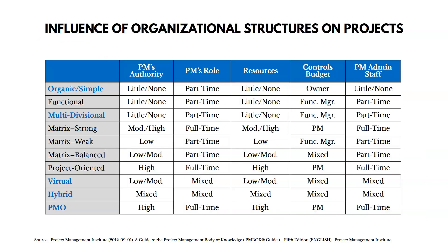There are other structures as well: organic, multidivisional, virtual, hybrid, and PMO — really a mix of things. The one we'll focus on in a moment is the PMO, the Project Management Office. In those situations, the PM's authority is high, the PM's roles are full-time, and the resources and budget are controlled by the project manager — very similar to a project-oriented organization.